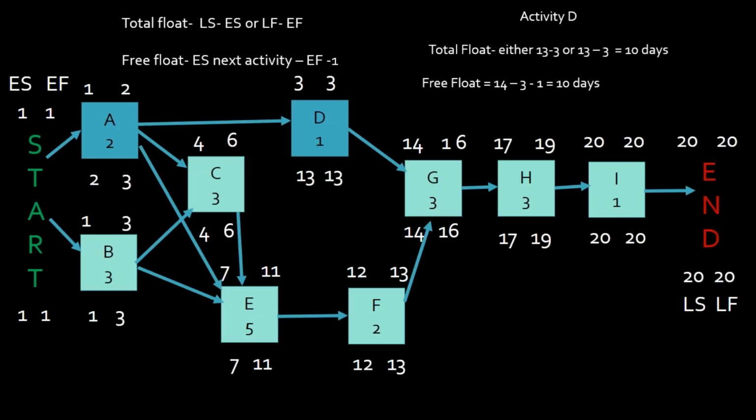So when I take a project into execution, I've planned it now, and I take it in execution, I'm looking at my critical path, folks. I'm looking at my critical path long before I even take it in execution because there's a point of risk. Risk management's going to want to look at G. Risk management's going to want to look at C because there's so much activity and so much dependency that there are so many things that could go wrong.